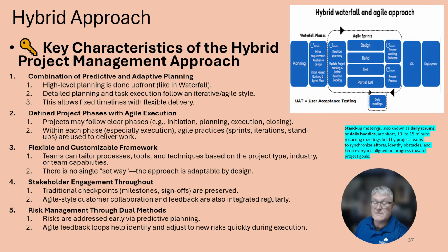Some key characteristics of the hybrid approach include combination of predictive and adaptive planning. High-level planning is most likely done up front, like with the waterfall approach. Detailed planning and task execution follow an iterative or agile style. This allows fixed timelines with flexible delivery.